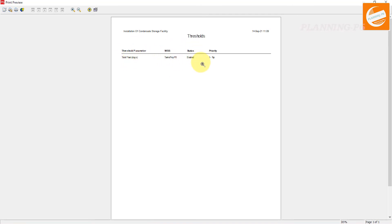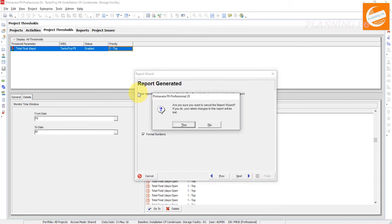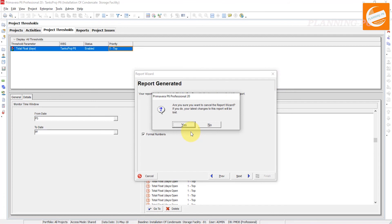You can see here what we have added. We have added only one threshold. The threshold parameter total float days, WBS, status, and priority. This is how we can manage and add our thresholds to the project in Primavera P6.